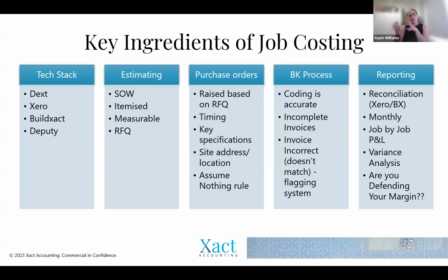Your estimates then roll into purchase orders. Purchase orders are the way of communicating your estimate through to your bookkeeping process. In reality, it's to make it easier for whoever's doing the bookkeeping and the data entry to make sure that they're matching all of the invoices that come through as accurately as possible. So your purchase orders should be raised based on your requests for quotes.